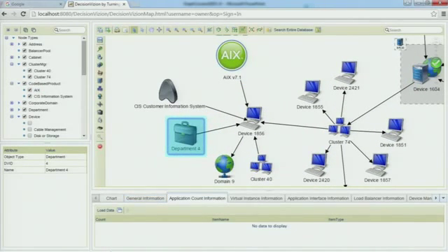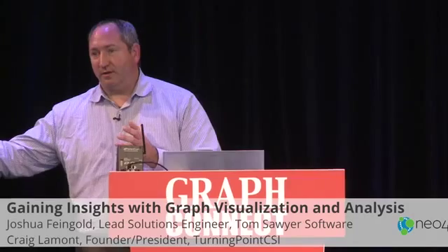Department 4. Now we can also drill into this department and we can see how many people are involved in this department. Is it 100 people across 5 different states? Or is it 5 people in one state? Basically, it's saying this department uses this machine, which in essence is saying that they're using this software. This little Star Trek badge is the icon that we're using for applications. So basically, this is the department that we might be affecting. Now, those are 2 totally different change management scenarios, organizational change management risk profiles, if you're changing something that affects 100 people in 5 offices, or 5 people in 1 office. So immediately we're giving you some more information about how you need to plan for this migration.